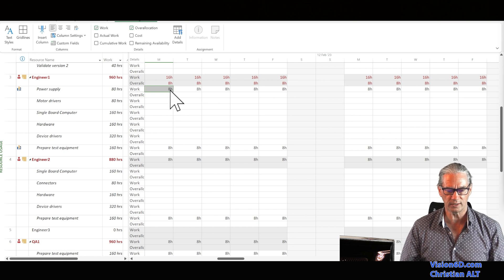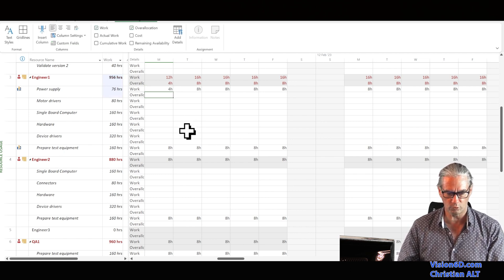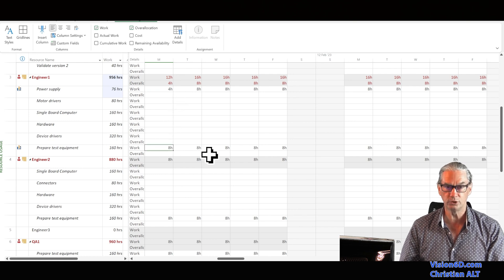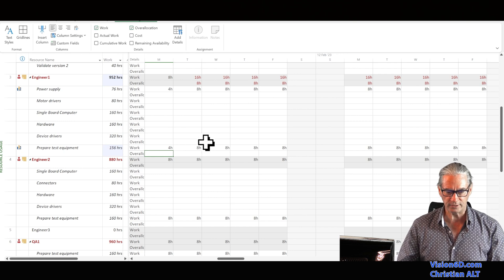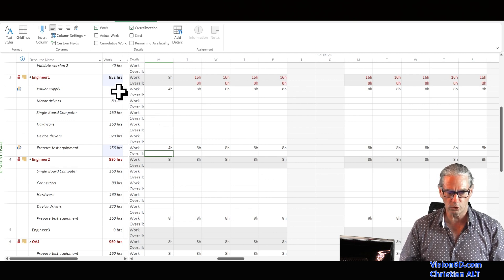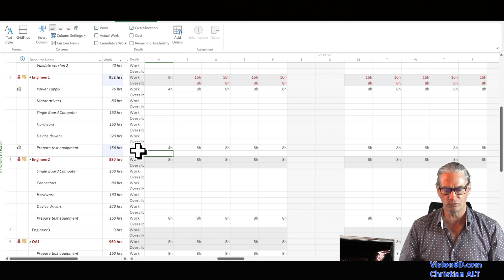This cannot be done as-is. We are going to say that engineer one will work only four hours on each task. I key in four for the first task and we see the over-allocation has been reduced by four hours. I do the same for the second task and the over-allocation disappears. The total hours for power supply and for prepare test equipment have each been reduced by four hours.